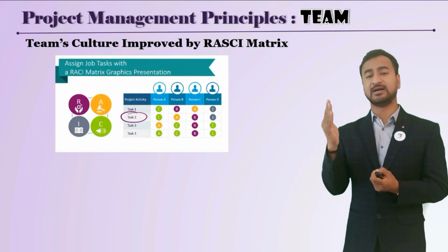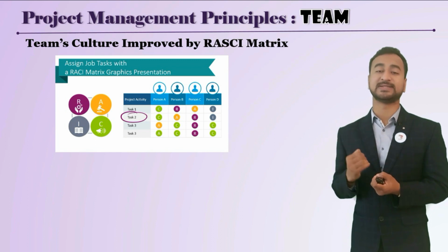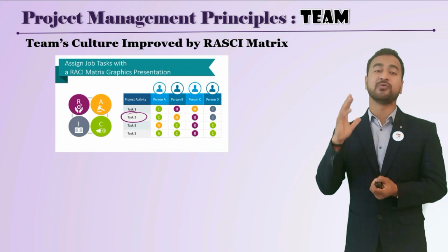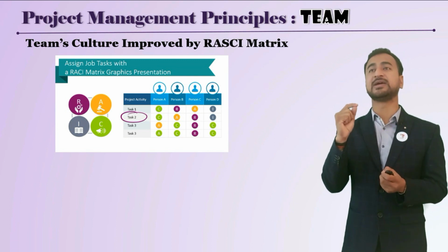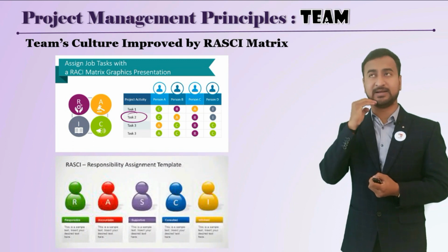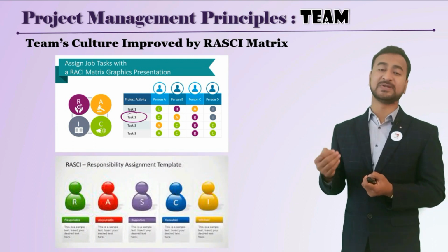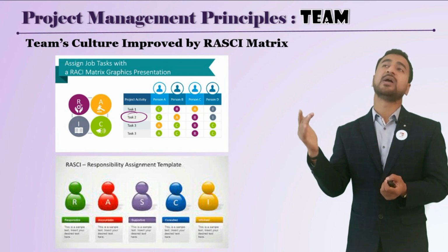That is the responsibility, accountability, consult and inform. That is the responsibility assignment matrix, by which you can see clear-cut responsibility and ownership assigned to the person. In certain refinery industries, they use the RASI matrix, in which they add support as also a concept, so that for